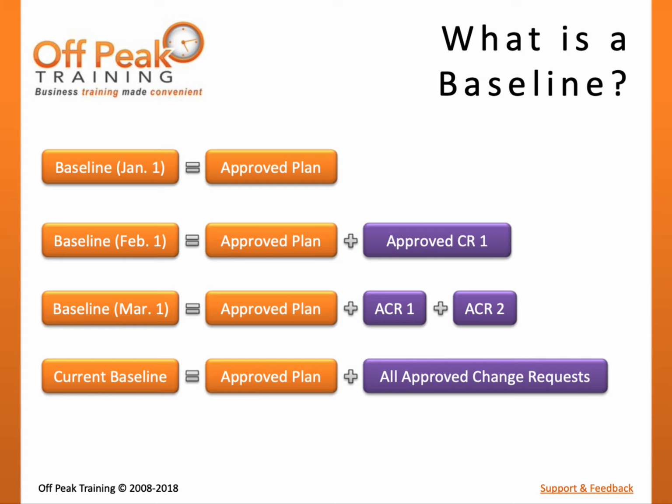While change is a natural part of project management, baselines can only be modified if changes have been formally requested and approved by a designated change control board. This process, sometimes known as rebaselining, must be well documented to ensure that stakeholder understanding of the desired performance goals is current and accurate.